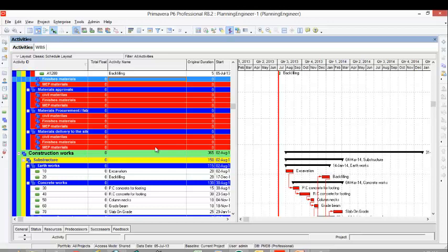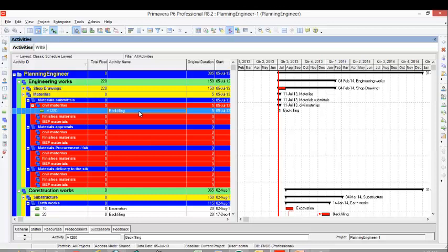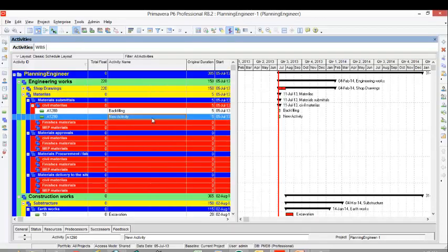For the concrete, we have the concrete mix design. So I will add a new one. Concrete mix. There is no material. We are not providing or submitting the concrete itself, but we are submitting the concrete mix for plain concrete and reinforced concrete.